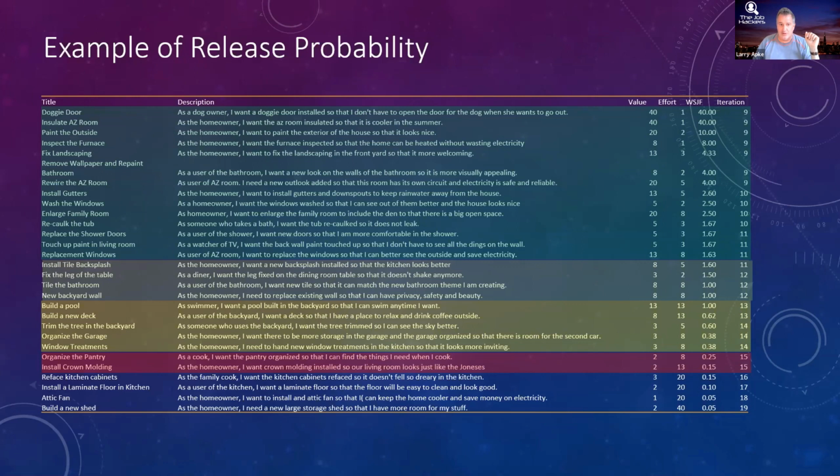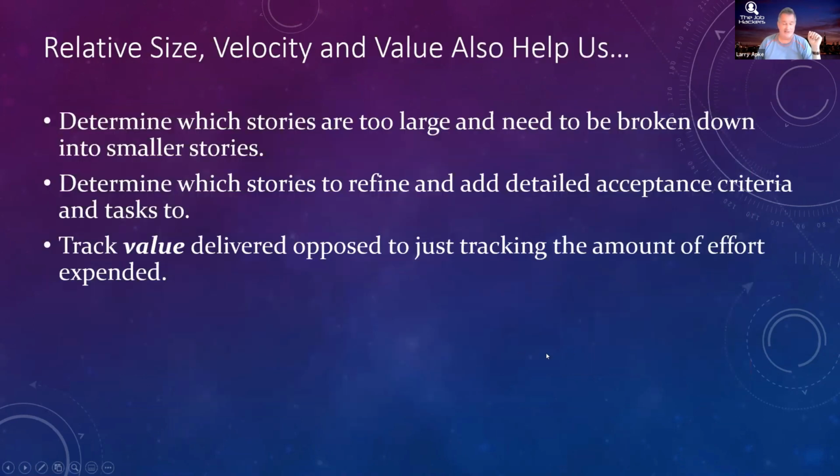Right? So what we do with my teams, and I do this literally in my day job, is we meet on a regular basis. It's part of our cadence, and I'll talk about that when we talk about Scrum. It's part of our cadence to assess any new work with value and effort as quickly as possible and get it in the proper sequence. And every time we add to or subtract from this list, every time we change the sequence, we change the schedule, but I can do it like this, right? And then I can start talking about probability of delivery versus absolutes, because delivery is never absolutes.